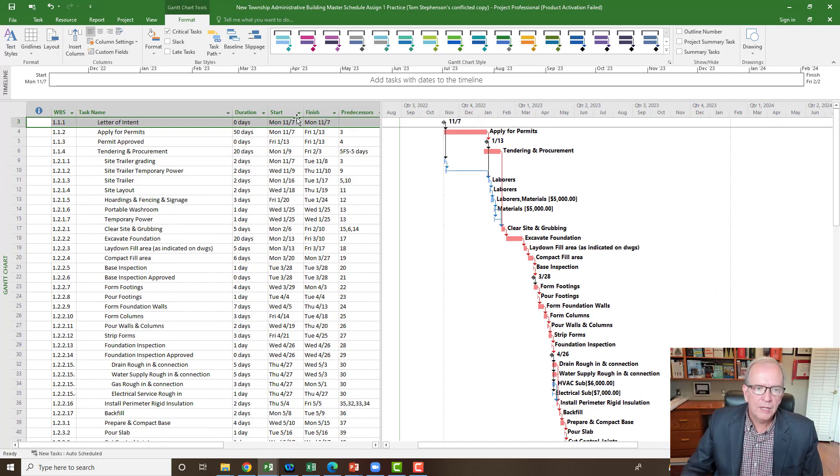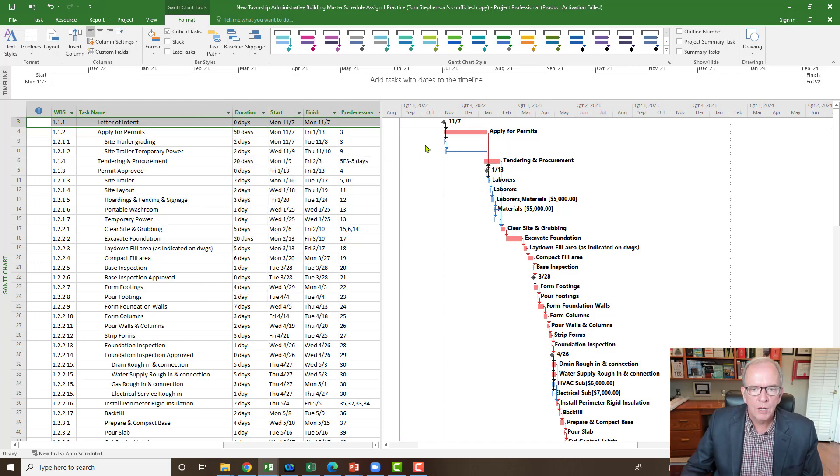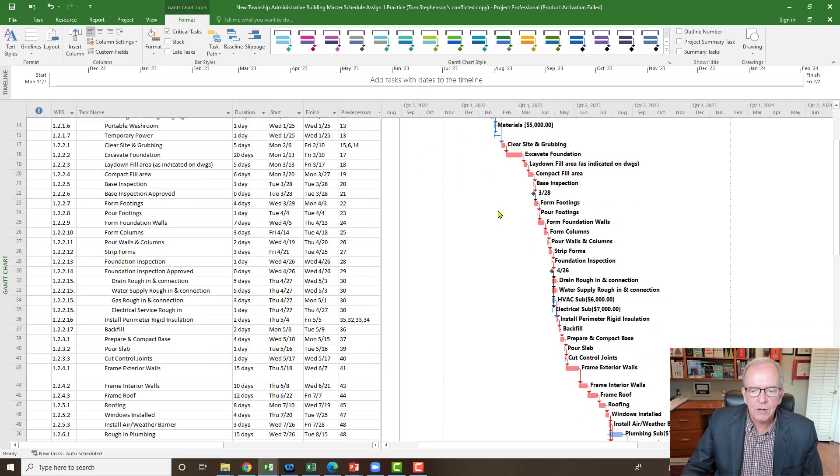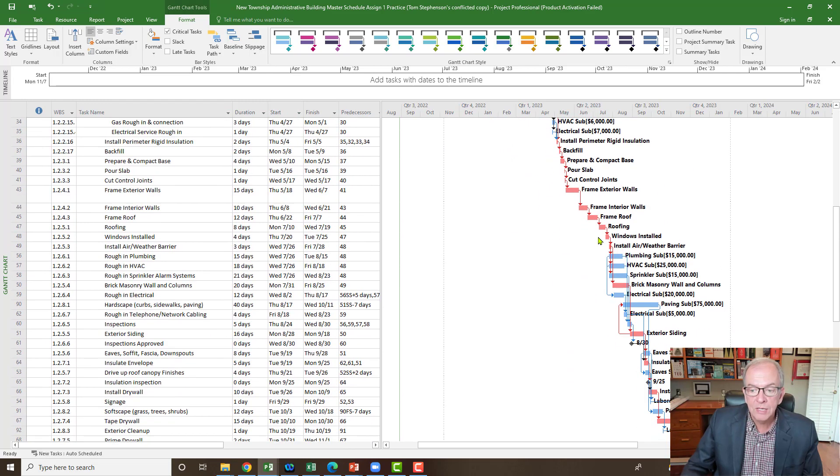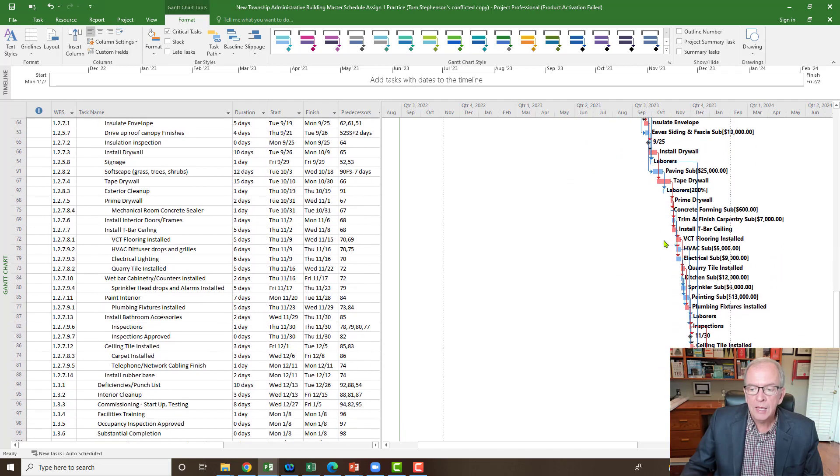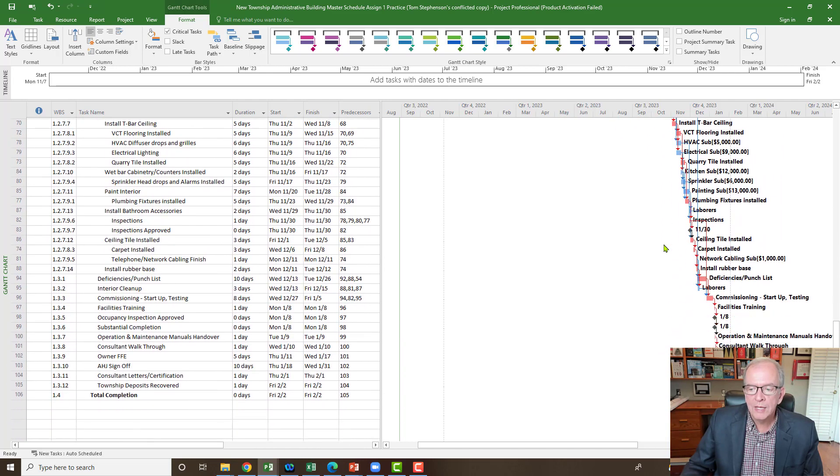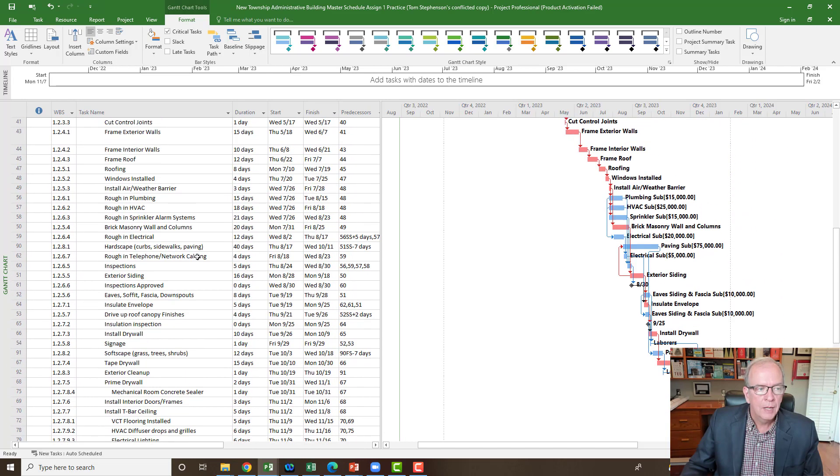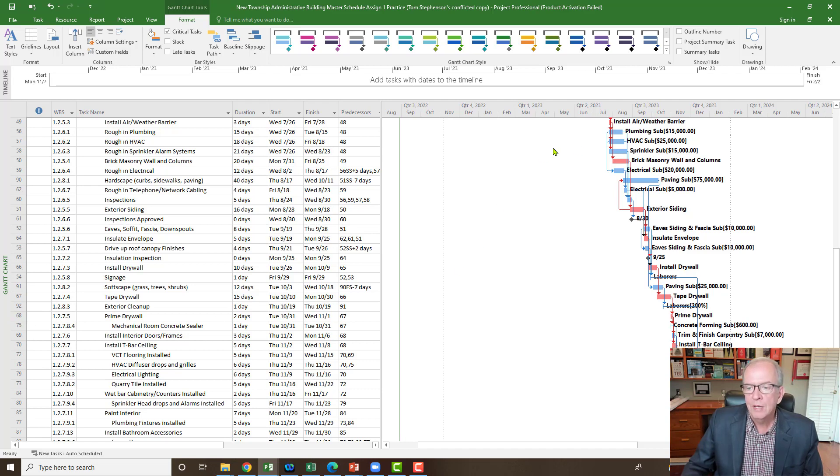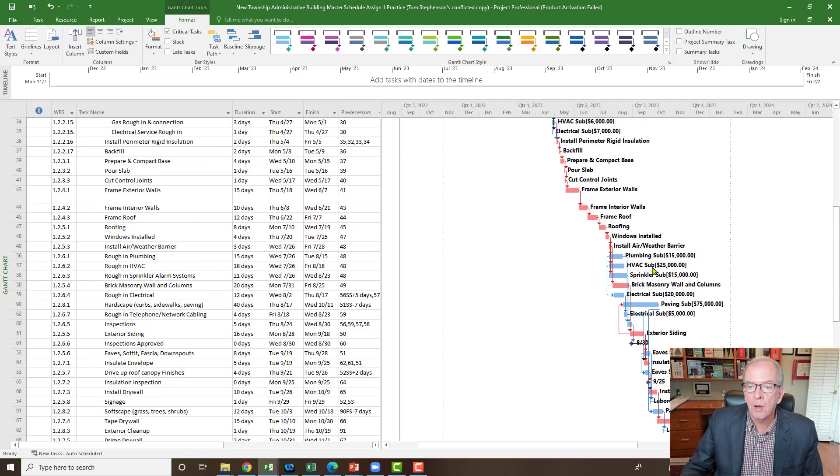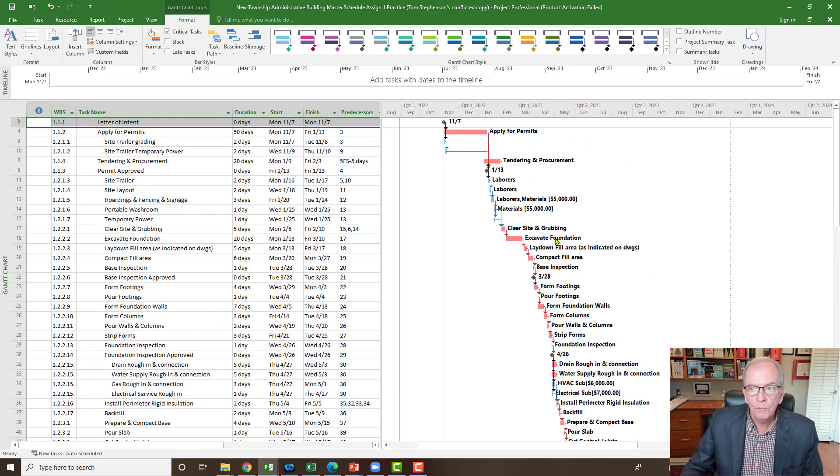So you can kind of see everything is right now organized by ID number. And each activity has its own ID number. Well, what I can do is I can go to Start, and I can say Sort, Earliest to Latest. Now watch what happens. When I do that, now I kind of see how things are organized. Now you see it's all like a waterfall. Everything is flowing in organization as it will come up. And you notice that my numbers, they're a little bit skewed over here. I've got like 91, 67, 92, 68, 75. They're not in the same order anymore, but they are in the order that they will come on my project, which is kind of cool, given that I've already had all that information in it.